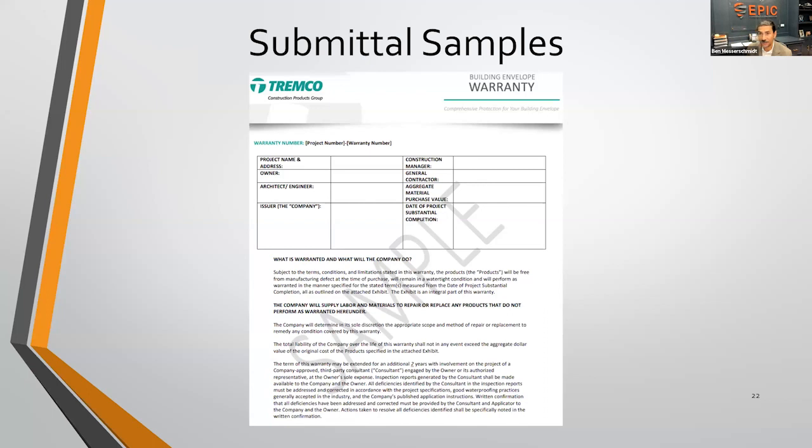We've been on projects where we've come in after the fact, let's say 2 years after a certain project was completed, and looking at a deficient condition and saying, okay, all right, this is easy. Well, if you did your project 2 years ago, you still have 5 years left on your warranty. So just file a warranty claim and this should be handled no problem. The association goes ahead and fills out the warranty paperwork, sends that over. Lo and behold, they find out that the warranty is not in existence for whatever reason, the contractor didn't file it or a plethora of different reasons.